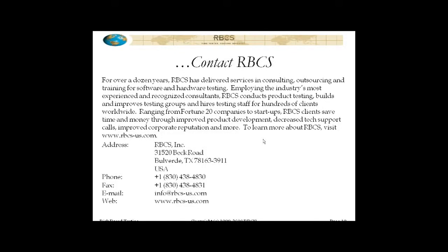That kind of argues against running the tests in pure risk order, and that's definitely something you can do. Just remember that the extent to which you're responding to those constraints and changing the order in which you're running the tests, you will undermine the benefit of risk-based testing that has to do with discovering the bugs in order of importance. So you want to be really careful about the degree to which you do that.